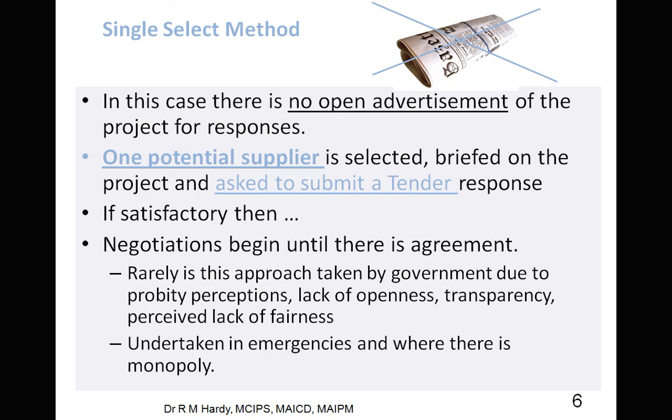I would say if you've got something that is going to be 5 million and above, then an open tender might be worthwhile because that level of project is not going to be appropriate for all builders, and you're only appealing to a certain range of builders, which is what you want. So even with an open tender, you still want to try and control the outcome a little bit, and not make too much work for yourself.